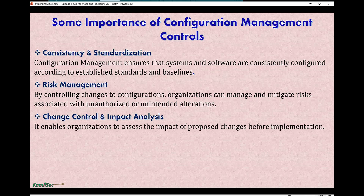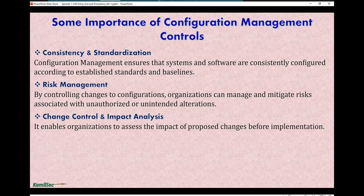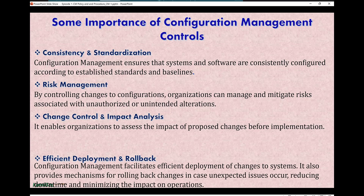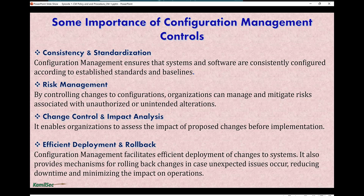Change control and impact analysis: it enables organizations to assess the impact of proposed changes before implementation. That is why we have the CCB — the change control board — meetings that review proposed changes, patches, updates to the system, system shutdowns, restarts, and rebooting. All of these are discussed in the change control to ensure that all risks associated with these activities are reviewed and analyzed prior to changes being implemented. Configuration management also facilitates efficient deployment of changes and provides mechanisms for rolling back changes in case of unexpected issues, reducing downtime and minimizing the impact on operations.